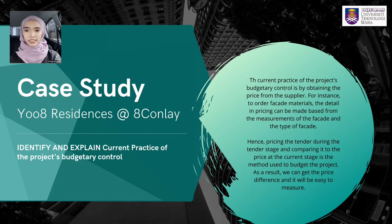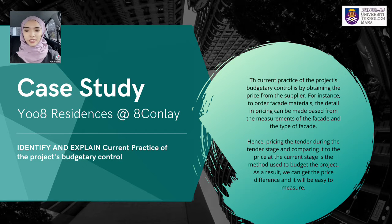The first problem is that supply costs can increase. During the Movement Control Order (MCO) due to COVID-19, there was a drastic increase and changes in material prices from suppliers. The second problem is that labour costs increased. During the MCO, the project was delayed for almost one year and management cannot claim variation orders (VO). This caused absorbed and increased labour costs.